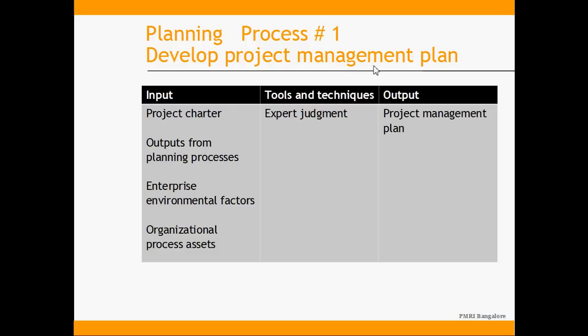While developing the project management plan, the inputs are: the project charter — already completed during initiation — outputs from other planning processes, enterprise environmental factors, and organizational process assets. Using expert judgment, the project manager produces the project management plan.